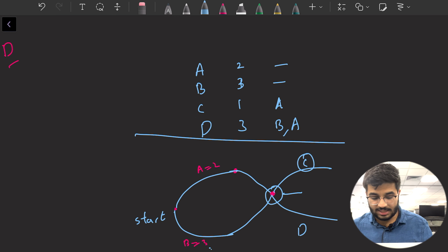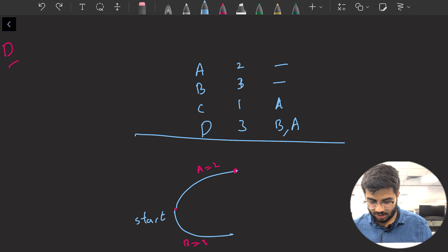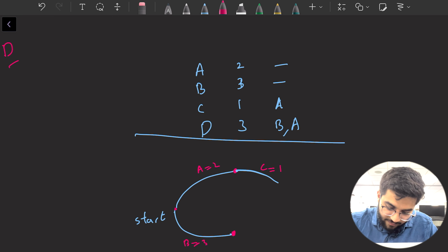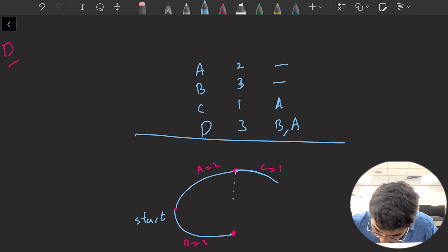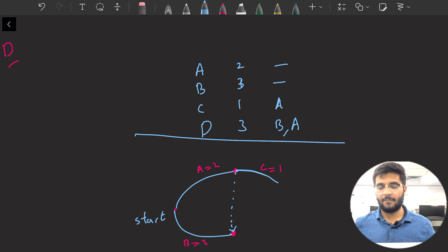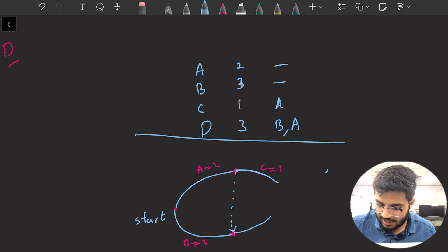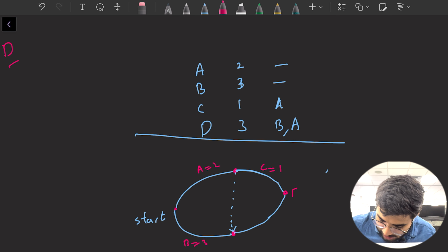So what we do instead is we use dotted lines. We're going to go back to what we originally had, this, and we're going to say that this is a state where I've finished B and I've also finished A. So that's how you would represent this particular scenario. And now I can go ahead and do task D and end up on a good little finishing point.